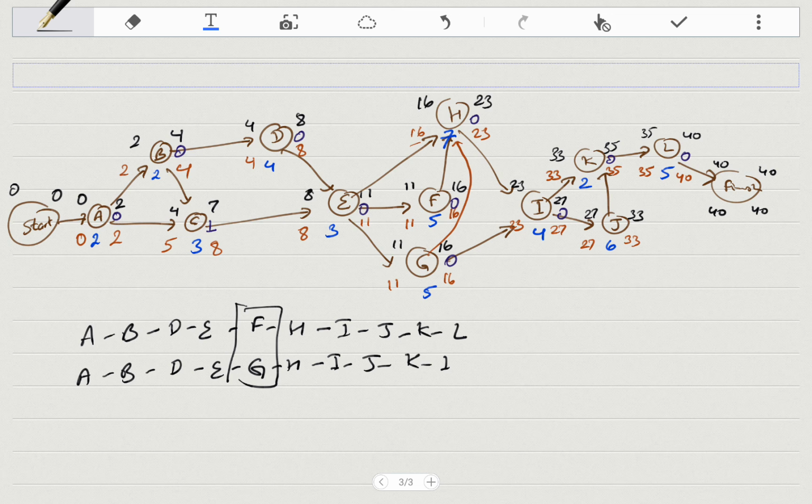Okay. So the idea is which one to use. Again, there are lots of thoughts among the scholars on how to do the PERT calculation. I suggest, again, both of them have the 40, otherwise both of them would not be critical path. So obviously we can't use that. So the idea is to find whichever path has the higher variance, use that. Use the higher of the variances.